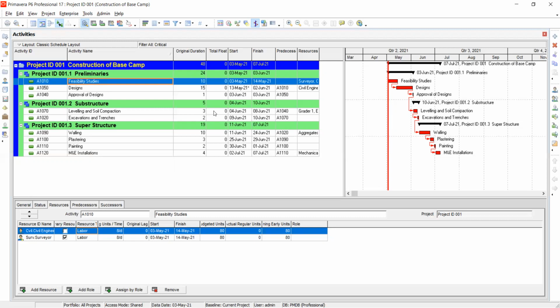So what does it mean? It means that is the shortest duration in which you can finish your project. In case you delay by one, it's going to delay the entire project. If you delay any of those activities by even hours or one day, you're going to receive time overruns. So the critical path is the shortest duration your project can have. You can see that now we only have critical activities, and this is our critical path.